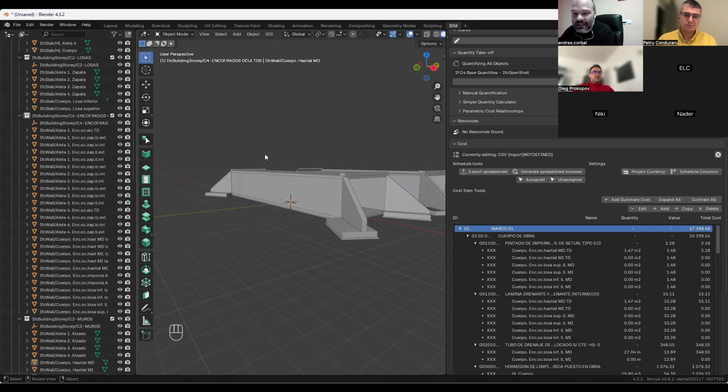So you have two types. One is the cost of it, or bill of materials. That's the database I usually start with, and then you have the structure of the project's bill of quantities. I always have two files: one for the selling prices, and the other for the cost prices for the company. It's very powerful.